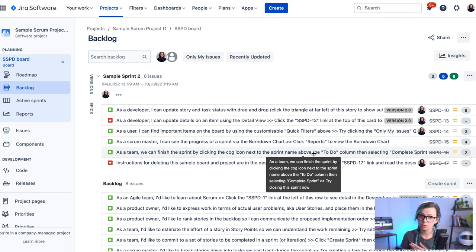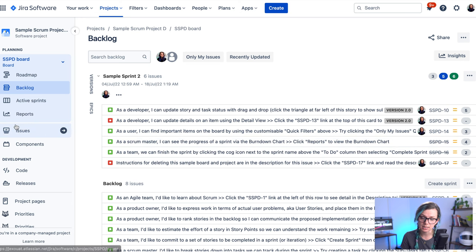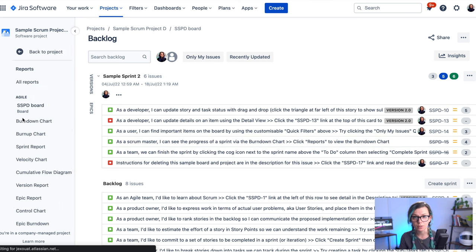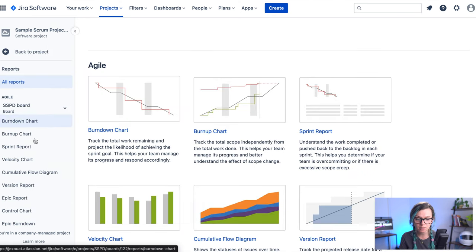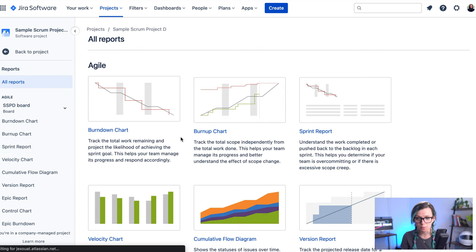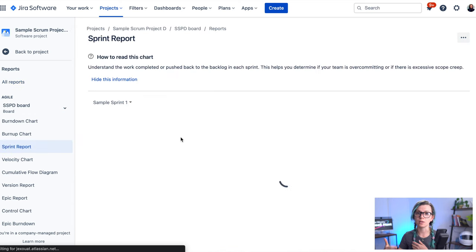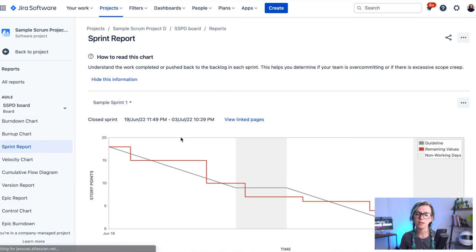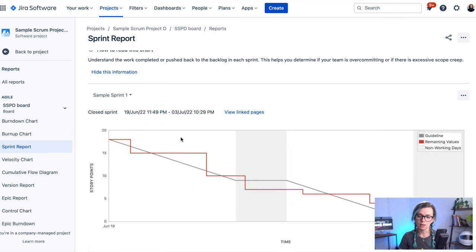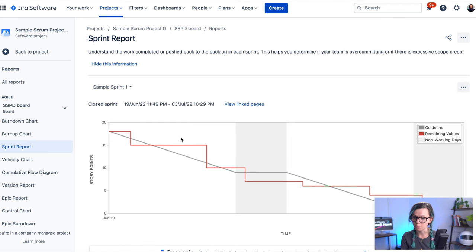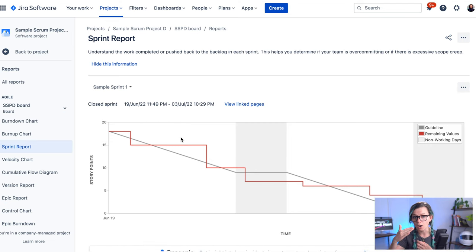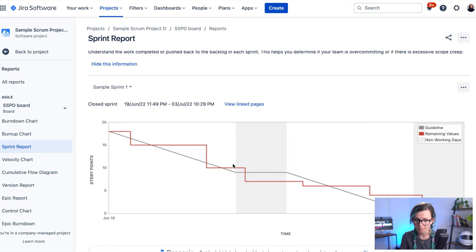They also have story points assigned. So for example, if you would go here to the reports and you would use a sprint report in Jira, you would already see your story points being burned down. And you would see also information about the guideline and how they should be burned so you can compare.